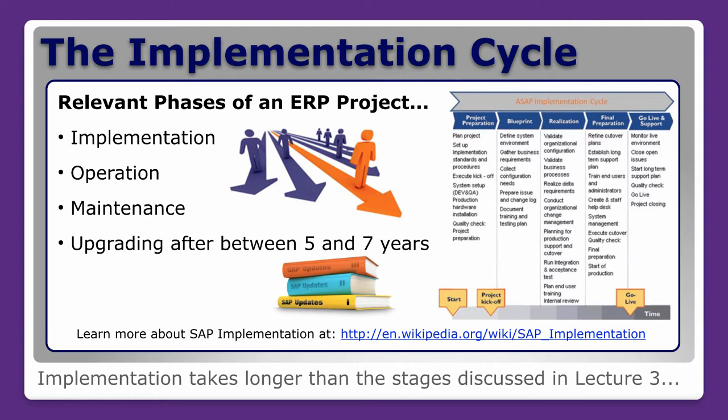The realization phase is about validating the configuration chosen, checking that business processes now work in the new format, looking at any changes in requirements that may have occurred, conducting organizational change management, planning for production support and cutover. Cutover is where you start transitioning from the old system to the new one. You also run integration and acceptance testing, plan end-user training, and review how well it all went.